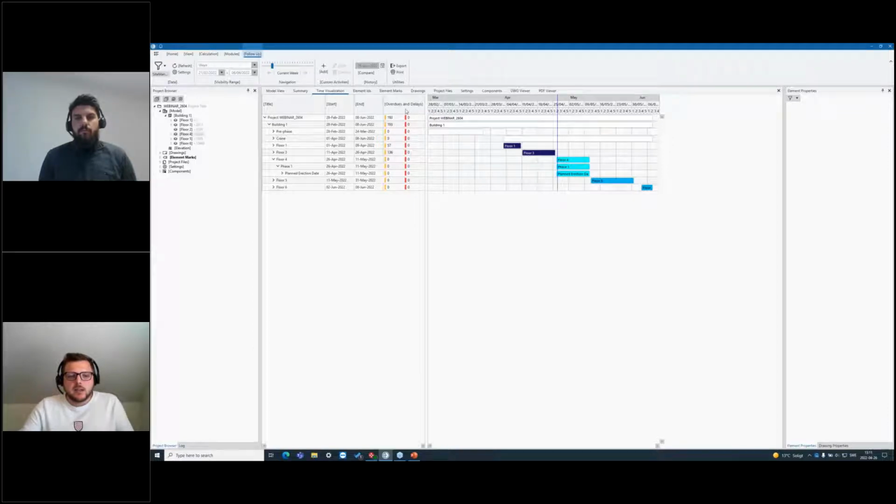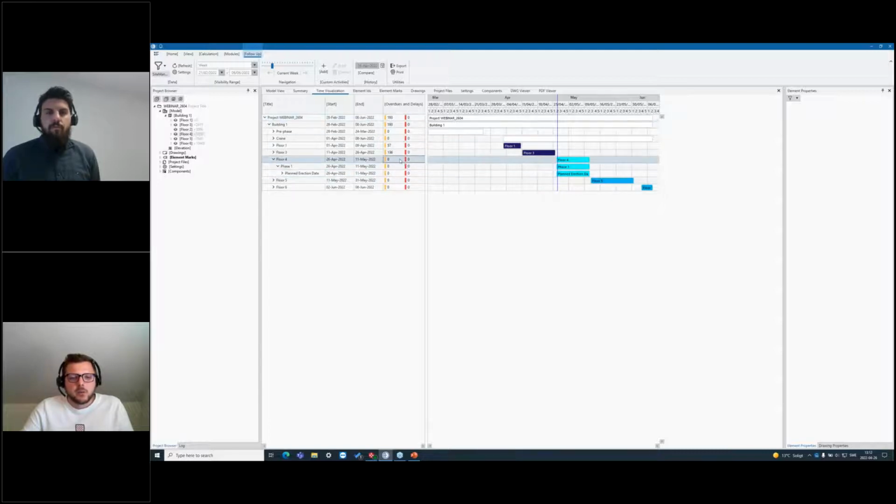A delay, in the other way, is that the transport on Friday didn't go on Friday, and it hasn't gone until now either. Then it means that it's more critical for the project, and then we highlight it with red here. So this is also a very nice and easy feature to get that information quickly.